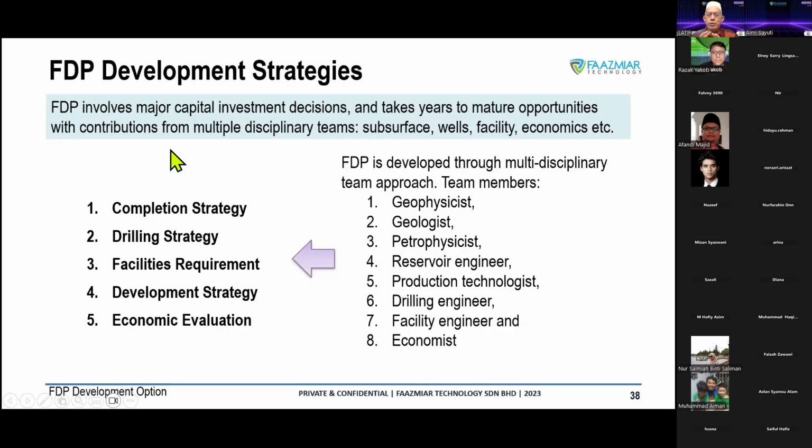Because the contribution of well cost to the project is 30% to 50%. For a big field, of course, it's going to be about 30 to 40, but for a small field, it's almost like 50%. It's more on the well, because the well itself is special. We drill a well with all the technology, with all the expensive services, with its special rig. Then, of course, one well, normally we go through sometimes like 20 million to 30 million per well. So if we have 100 wells, it's going to be about how much? Yeah, it's going to be about under 200 million, something like that.